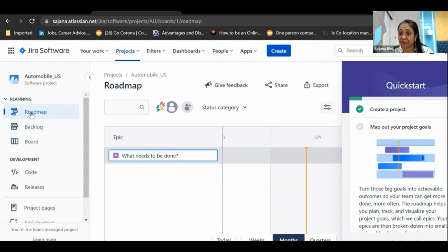What I'm going to do as the first step is create some epics. So I'm going to act as a product owner. So remember, guys, product owners create epics. And as BAs, we have to break down these epics into user stories. So in most projects, the sequence that is followed is that epics are broken down into features and features are broken down into user stories. Okay. So in the Jira tool, we add epics and we add user stories.